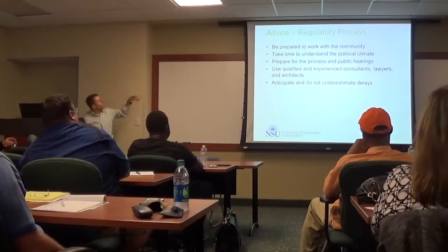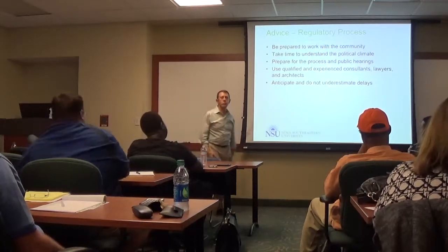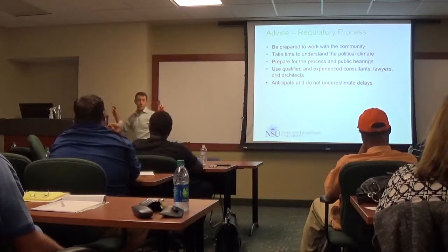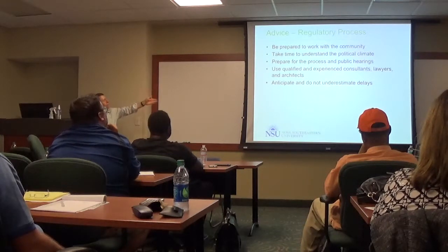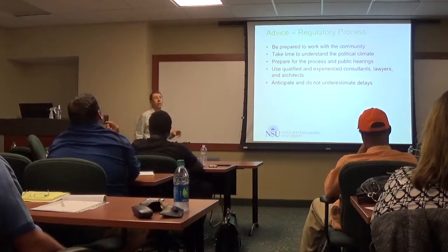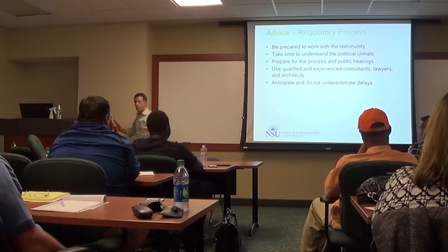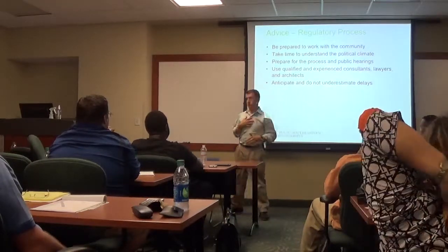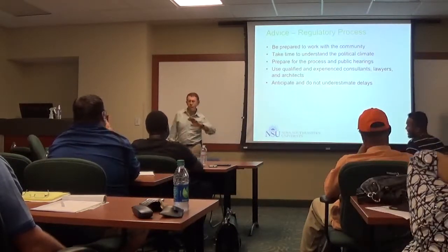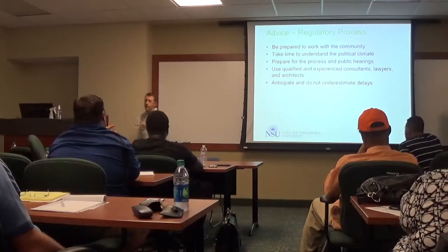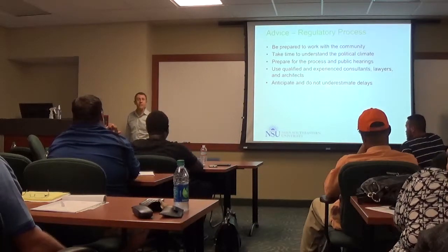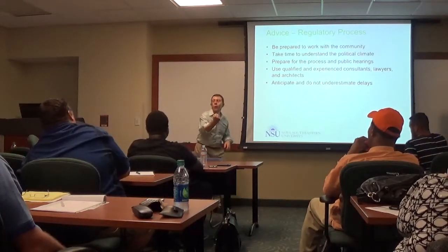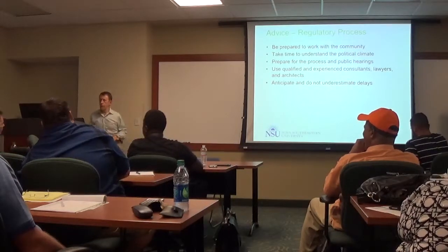All right, so look, the regulatory process: any deal you do, if you buy a site, something's going to happen, you better know your local partners, if you will. So this is all about the process. They were very lucky they didn't have to go to a public hearing. Very fortunate. I love my neighbor, but not when I'm trying to get an approval for my project, right? I've been to many, many zoning meetings, and as I said, it's an important process. It's good to engage the community, but as developers, you want to control that process in the best way you can.